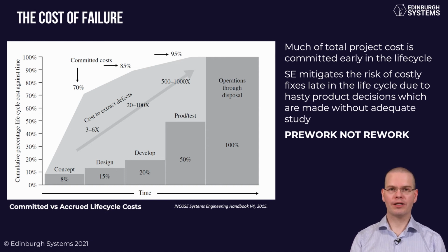So you want to make sure that you make those decisions correctly. And before you have something physical in your hands, it's a lot easier to change your mind on things. It's a lot cheaper to change your mind, because the cost of extracting those defects and fixing things goes up as we progress in the design life cycle.